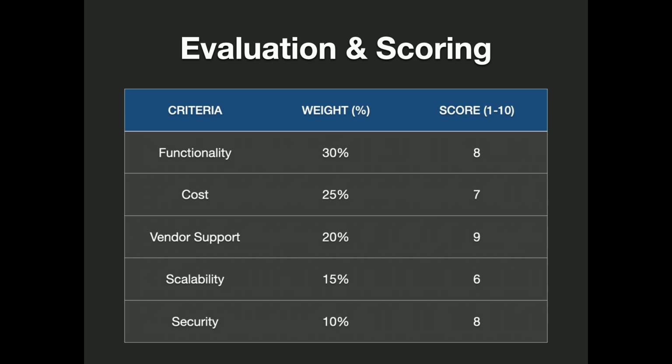So when you set up your evaluation, you need to review your requirements, and once you put those in, you can rank them with a weighted score. An example of the weighted score is must have, nice to have, and bonus.